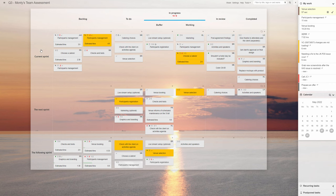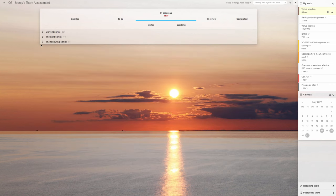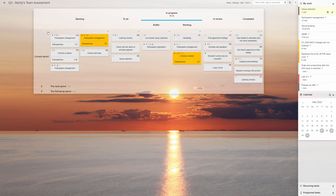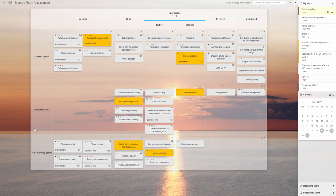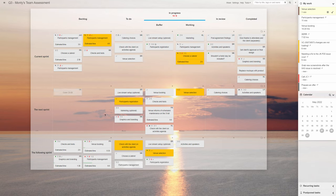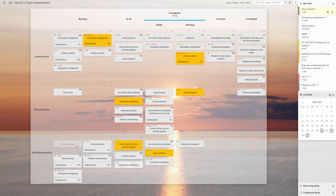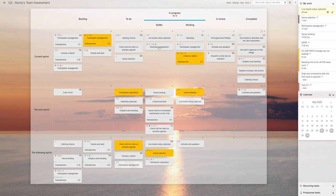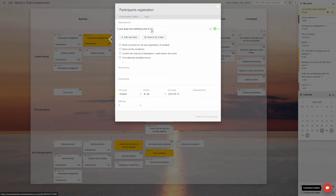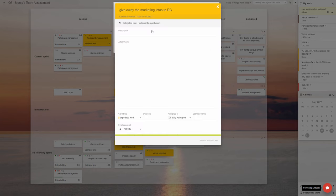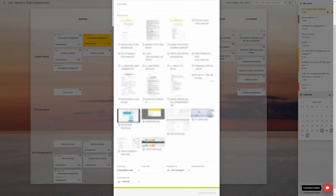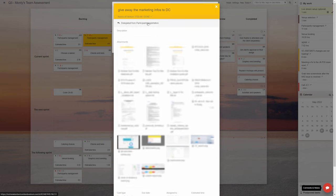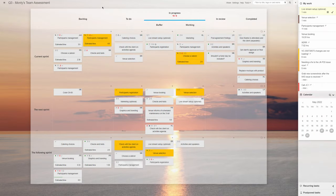It's a convenient approach to use in workflows where planning needs to reach a few sprints ahead. It lets the manager add specific tasks to given iteration swim lanes while the team focuses on just one at a time. That will also be a good solution for processes in which one sprint's tasks relate to or depend on other iterations' items. Keeping each iteration visually separate helps to make things neatly organized.